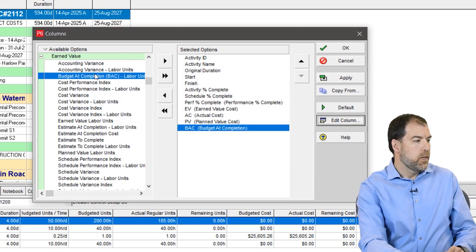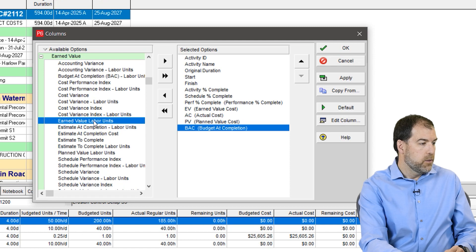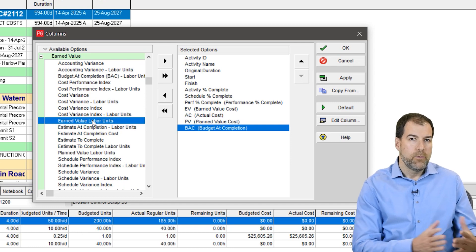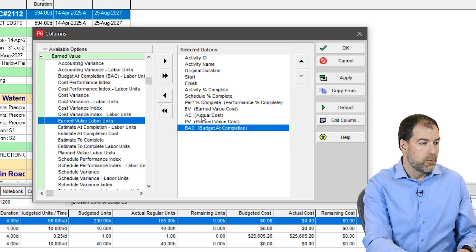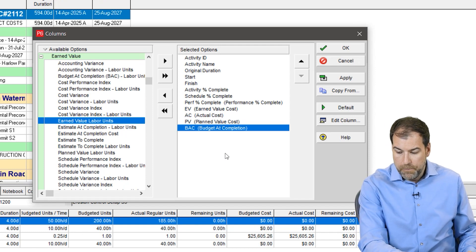A quick note: many of these earned value fields have two versions. For example, there's 'earned value' and then 'earned value labor units.' You'd use the labor units version if you're specifically tracking earned value according to labor. But if you have other costs in P6 not attributed to labor — like material costs or overhead — you don't want to look at just the labor unit versions. You want the ones we've added: EV, AC, and PV. That's why there are two versions; some of this is legacy from earlier P6 versions.